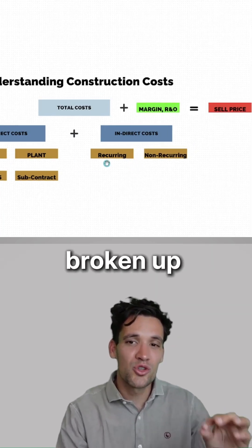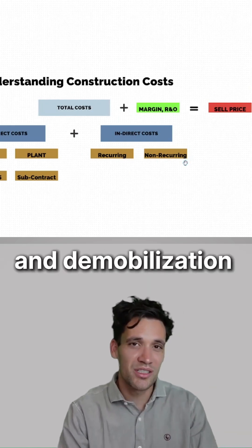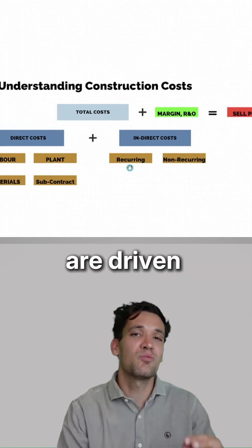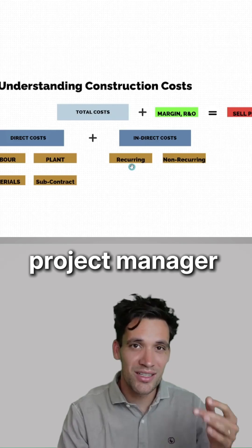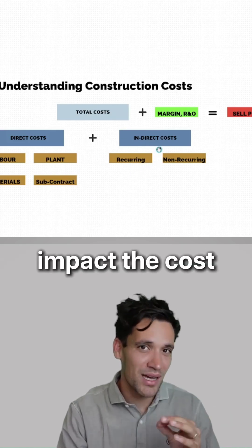These are going to be broken up into recurring and non-recurring costs. Non-recurring costs are one-off mobilization and demobilization costs, costs for doing inductions. Recurring costs are driven by the duration of the project, like your project manager salary. That's why understanding how long something takes to build is going to impact the cost.